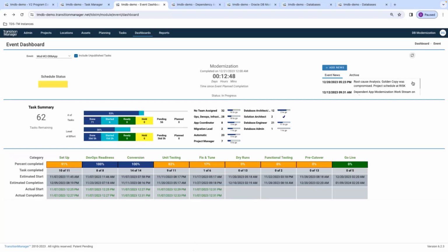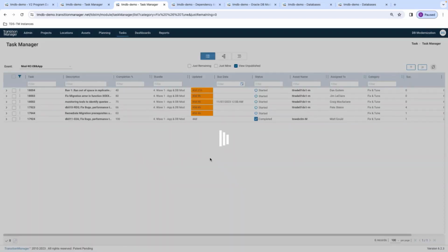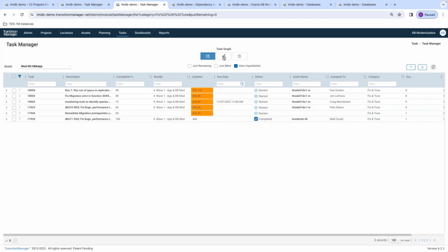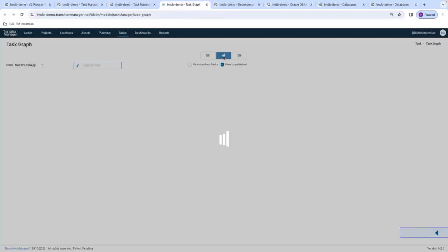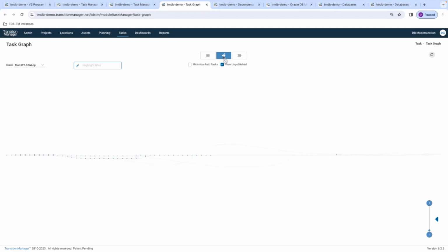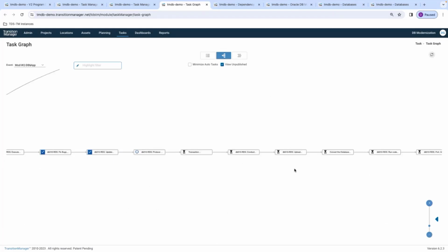So we're going to do 2 things here. For one, everyone is command and control of that. We now know that, and we know we can fix the golden copy. So if we go back to how we're generating those tasks automatically, remember, this is looking at the criteria of the database, generating the path for it. We're going to add a step into this to basically log the golden copy, the version that was taken, the date, who passed it. So we have that benchmarked. We're going to add that as a step into the process, and so it'll happen every time going forward. I always say, fool me once, shame on me, but you're not going to fool me twice.